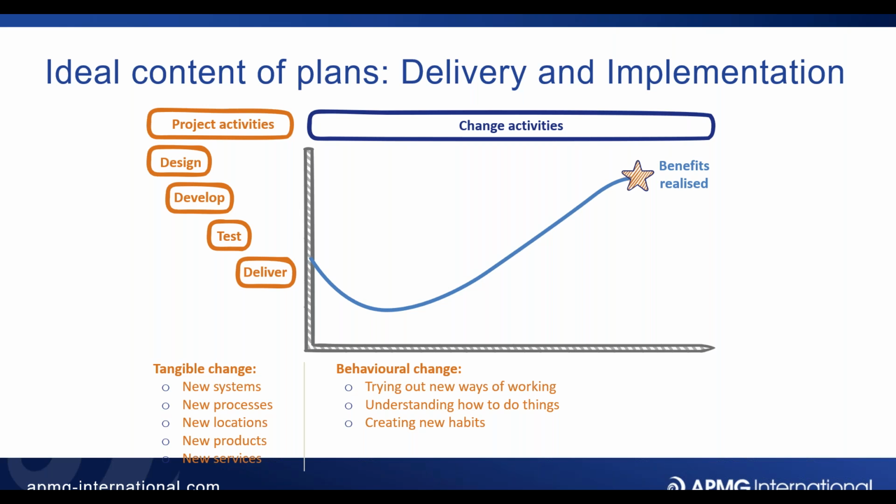And that certainly changes the content of plans. An awful lot of organisations are talking about how they are having these, what are often referred to as integrated project plans now. They're integrated with the change plans. So they've got both the delivery or project activities along with the behavioural or change activities that are actually in place there.